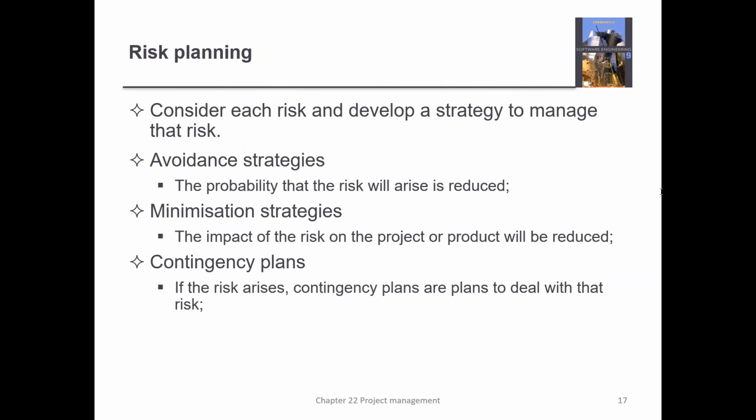Creating your priority list of risks. Which ones are the most important ones? And then you look at it. Yes, you rank them in terms that actually make sense. Which ones are catastrophic, have minimal effect, all of those things. And then you start planning on how you're going to reduce, or as this says, avoid, minimize. You have strategies for those, and you also have contingency plans.